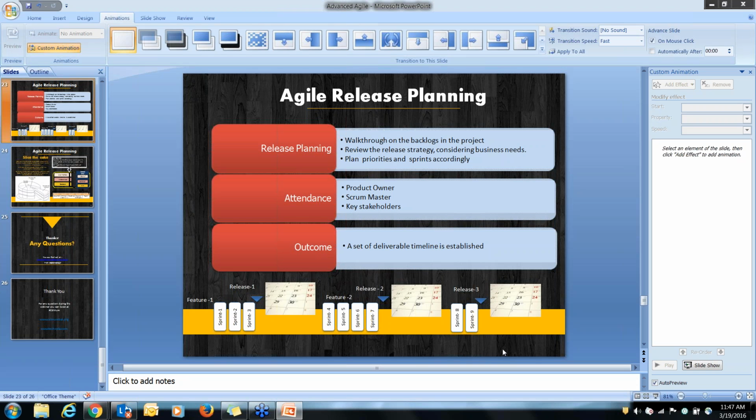So initially, the stakeholders who initiate the project do the case study and get the business case, and they mention in a disclaimer that this is the percentage of requirements which we will pick up based on the agile way of working. But if it goes beyond, then of course it will induce extra cost, because otherwise there is no clarity. The customer can come up with requirements at any point of time, and the duration and the scope will change. So you have to specify this as a part of it.